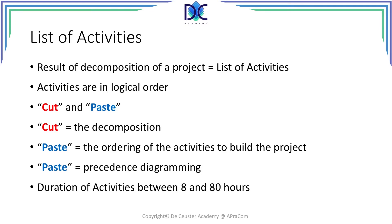In fact the decomposition of the project is a kind of cutting the project into pieces. All those activities now have to be assembled and combined in a specific way to create the final deliverable which is the project. That's why I talked about this as a cut and paste operation: the cutting part is the decomposition of the project, while the paste part is the ordering of the activities in the precedence diagramming to build the project.